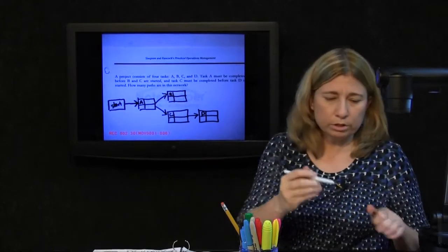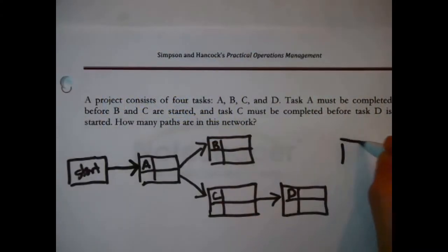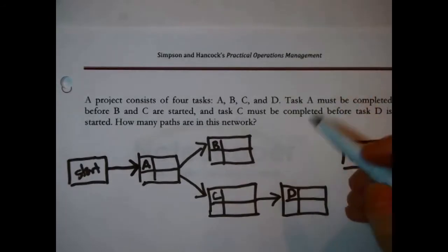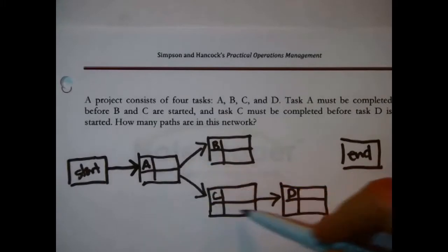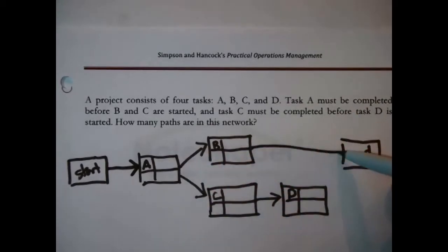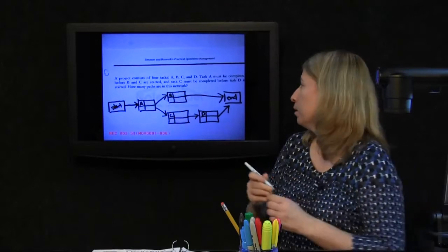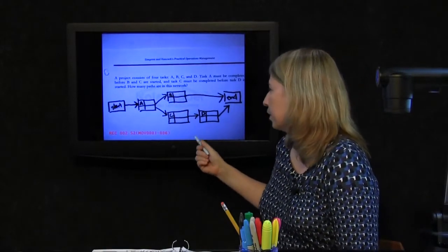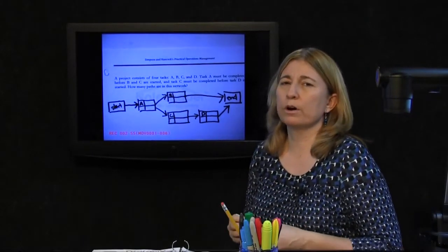then to finish this particular diagram, we do need to draw an ending node that represents being finished with the project. Now, who do we connect here? We connect any task that has arrows pointing at it, but no arrows leaving it. And I see 2 of them, B and D.